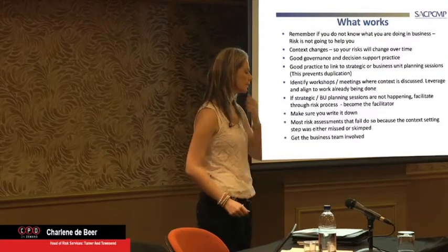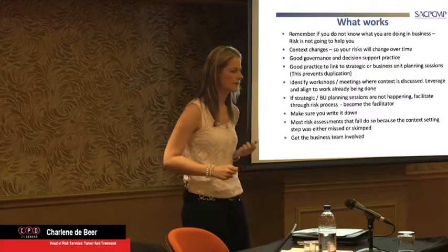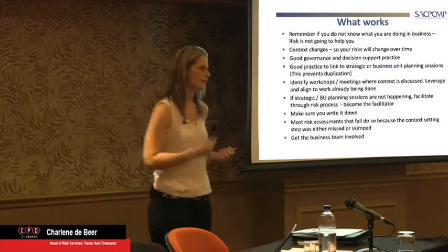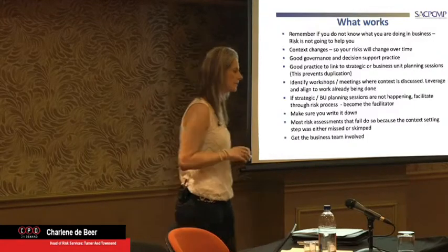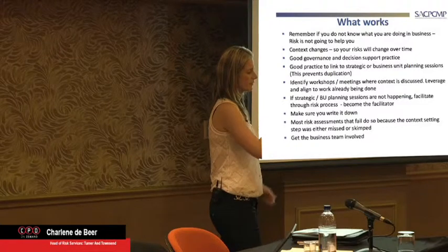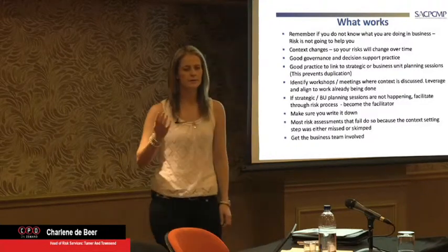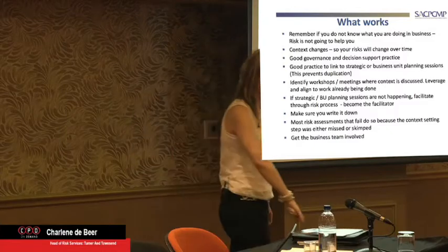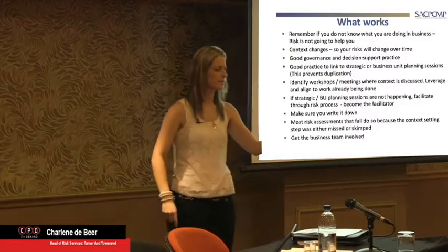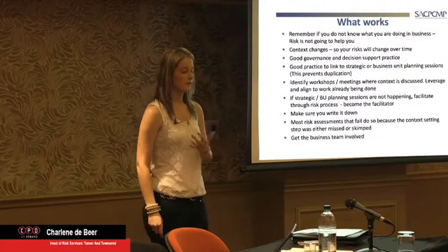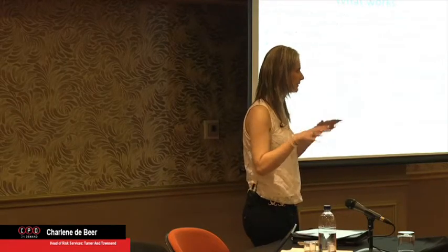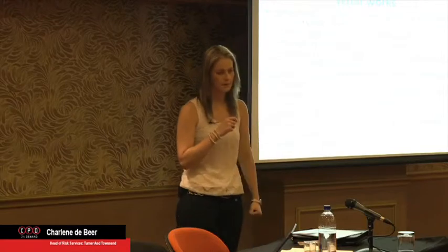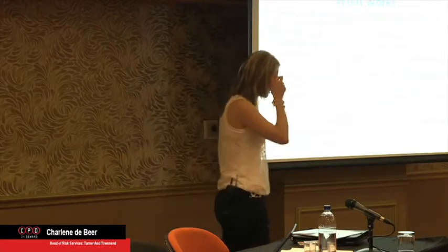And from a risk point of view, I sit a lot with the commercial guys as well. So if we run NEC contracts, on any early warning that we issue, or that we get issued, whether we're a contractor or client, doesn't matter, we should have a risk reduction meeting. We all know minutes of meetings mean nothing. A mediator or arbitrator says, I don't care, it's not contractual, just give me your contract. A risk reduction meeting in an NEC, if the contractor or the client promises to do something about this early warning that was raised, because it's in their camp, they need to do something about it. They bind it to clause 16.4, which means it becomes contractual then.